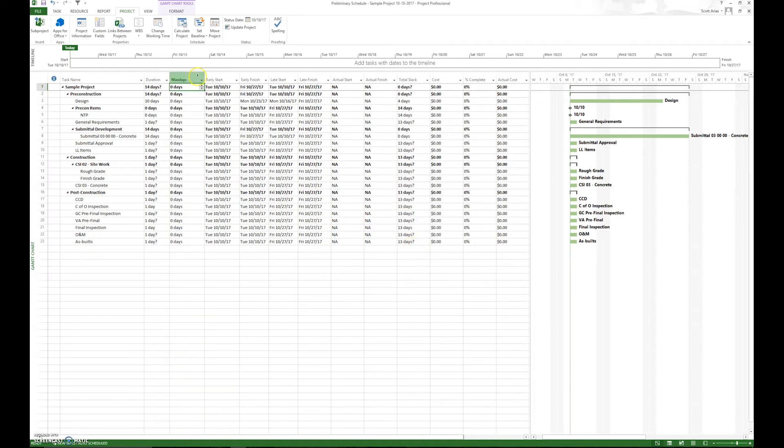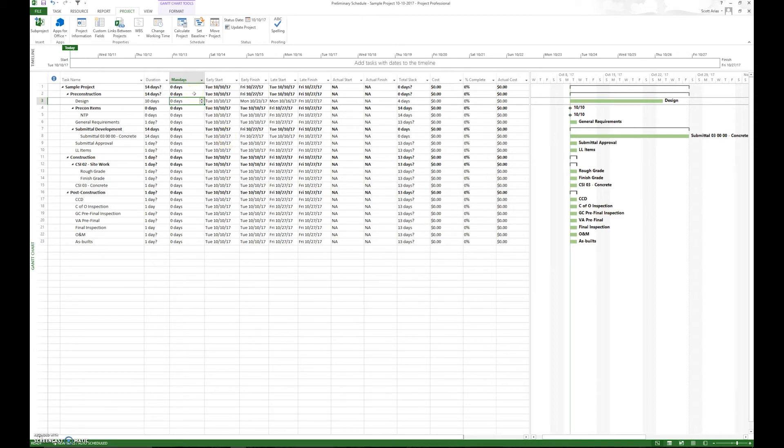Now, what is man days? Man days is simply the number of people that can be working on a task. So if you have design, you have two people working, two designers working on the design for 10 days, it would be 20 man days.